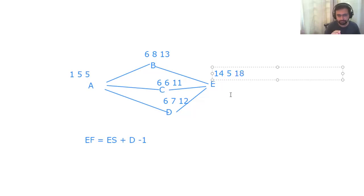Now interesting thing. Since B is giving to activity E, so A, B, E automatically becomes the critical path. If your path is as simple as this one, you can stop the calculation and you can go and check the option, whichever option you have. In my case, the option A. So you can choose that.